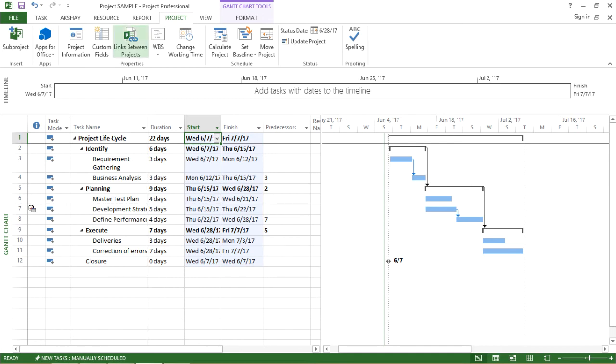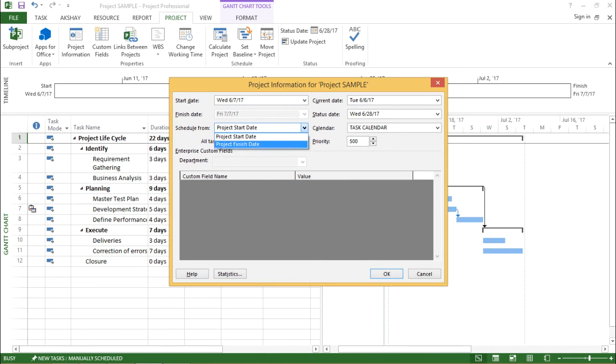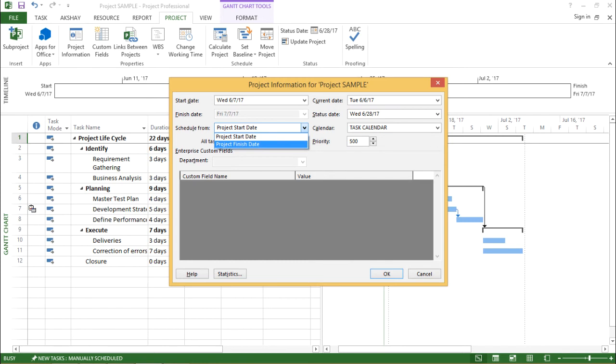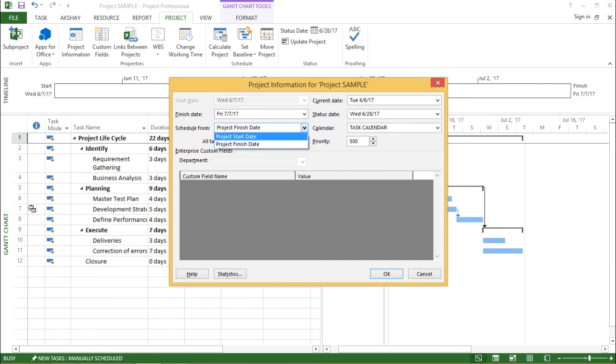Now, let's try to understand the next element and that says schedule from. So what does this schedule from say? If I click on this drop down box, it gives me two options: project start date and project finish date. So if I click on project finish date, if you see the start date gets phased out and my finish date now comes into picture. So in this way, I can select the start date and the finish date according to my priorities. So this is for start date and finish date using schedule from.